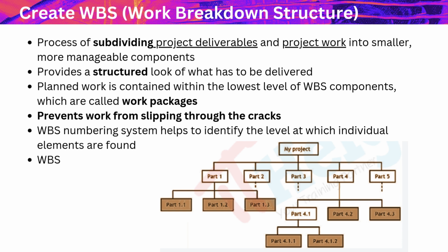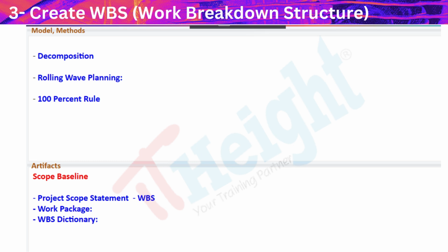Benefits: ensures all work is captured, prevents tasks from slipping through the cracks. Simplifies project tracking and control. Artifacts of the WBS process. WBS dictionary, describes each WBS element in detail. Scope baseline, combines the scope statement, WBS and WBS dictionary.